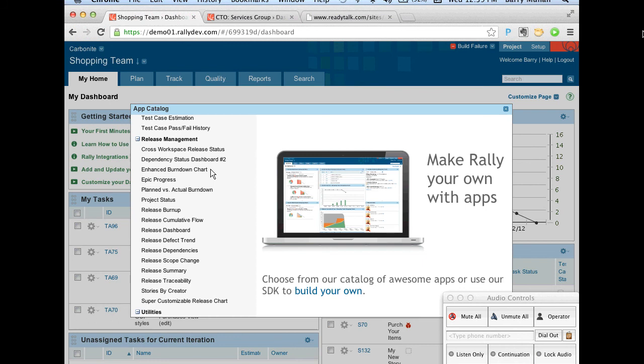So one thing that I found was very useful with the product owners in the past is they send an email saying, these are the list of stories I'd like to see fixed, and those are the bugs I'd like to see fixed. Once that is done, we can release, right? So it's not based on time, it's based on when these things get done.